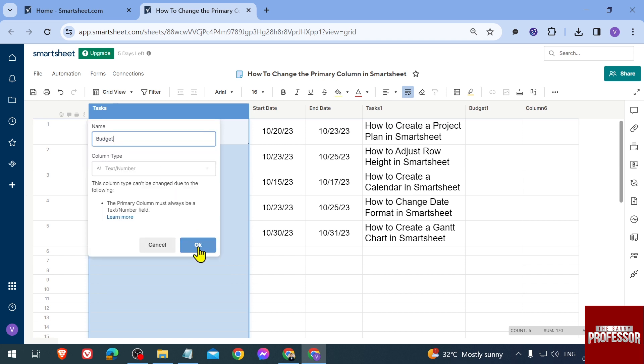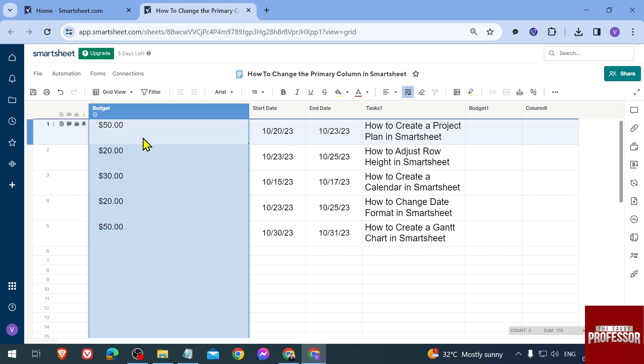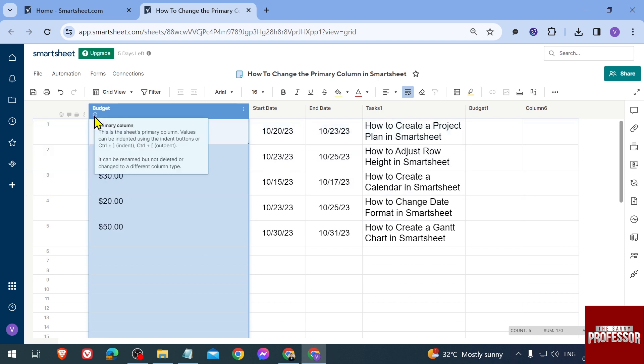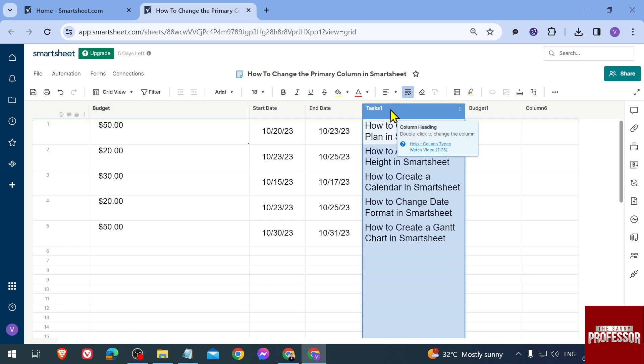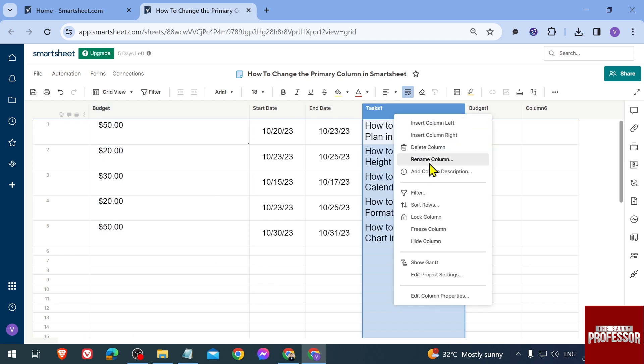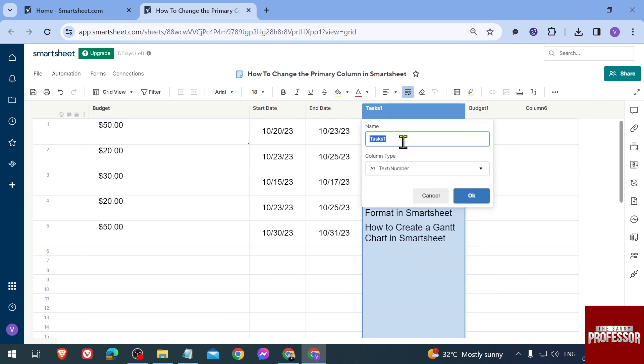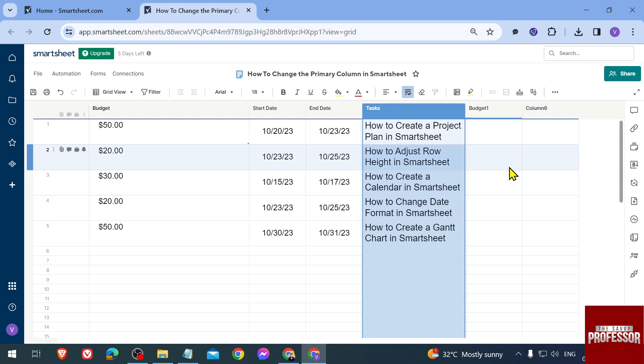We're going to click OK, and there you go. Now you can see that this is now our primary column. This one, we're going to rename once again and remove the 1, then click OK.